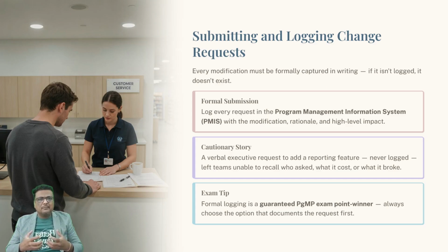Years ago, I was managing a complex infrastructure modernization program when a component lead received a verbal phone call from a senior executive asking to add an extra data reporting feature to a software module. The lead immediately told his developers to start coding the feature without writing down a change request. 2 weeks later, nobody remembered who asked for it, how much it cost, or what else it broke in the schedule. We instituted a strict rule: if it isn't logged in our change system, it doesn't exist.